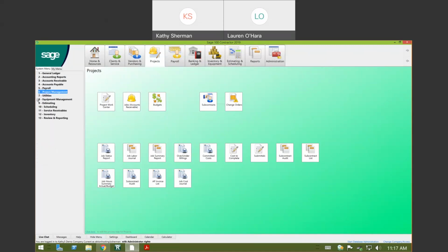And then if you use heavy equipment, this is an add-on module. It gives you the ability to job cost the equipment. You can set up daily, weekly, monthly, hourly rates for your equipment and charge those to jobs, and then keep track of your equipment to determine if the equipment is profitable with what you charge it out and what you have cost-wise. And then estimating, we also have what's called basic estimating. It is an add-on module to this program.